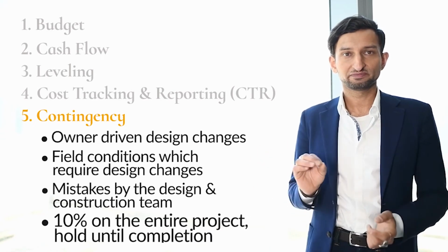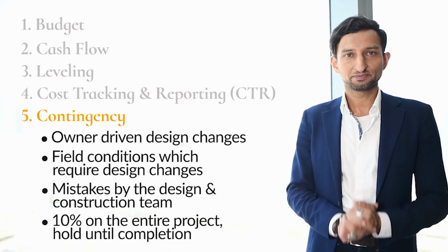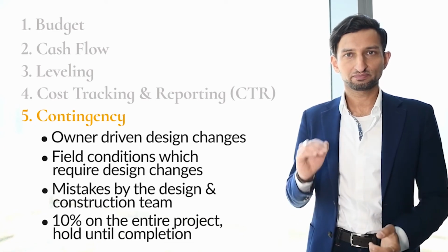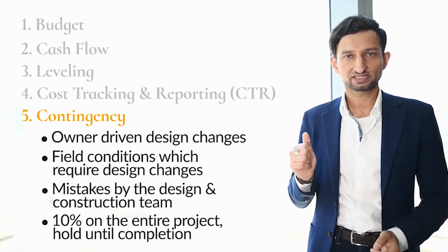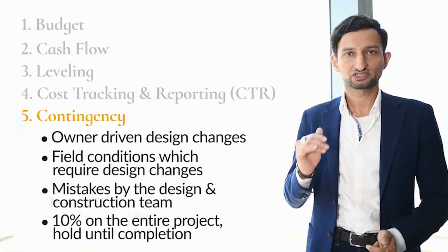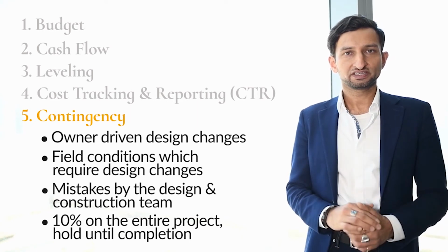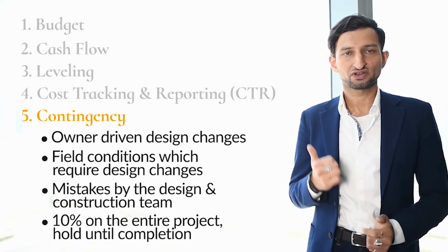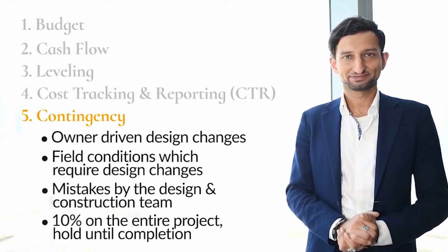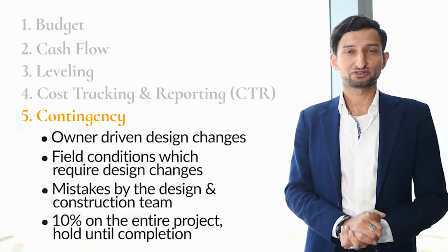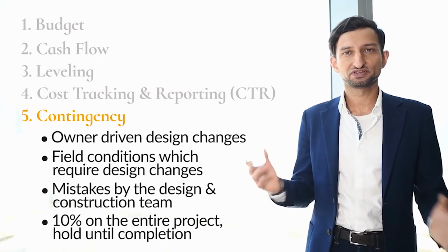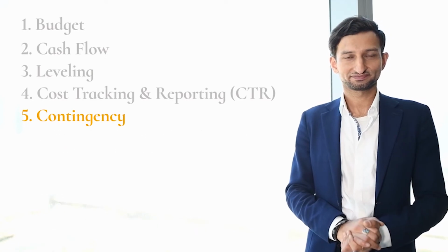So we definitely recommend that you add a project-wide 10% contingency that is set in place once you actually achieve true costing of your project in hard design, construction, procurement, delivery, and installation costs. Similarly, contingency should be set up for vendor orders also at the time that orders are placed. Sometimes maintenance budgets may also require contingencies, which we'll cover in more detail in our course on maintenance.